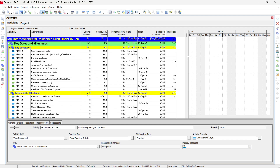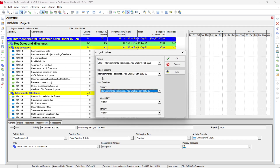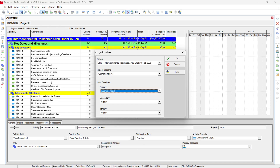A quick way to check if a baseline is assigned is to look at the bottom of the screen. At the bottom, the program provides immediate information about the portfolio, access level, data date, and whether a baseline is assigned. All this info is immediately available there. To confirm, we can go to Project and then Assign Baseline.